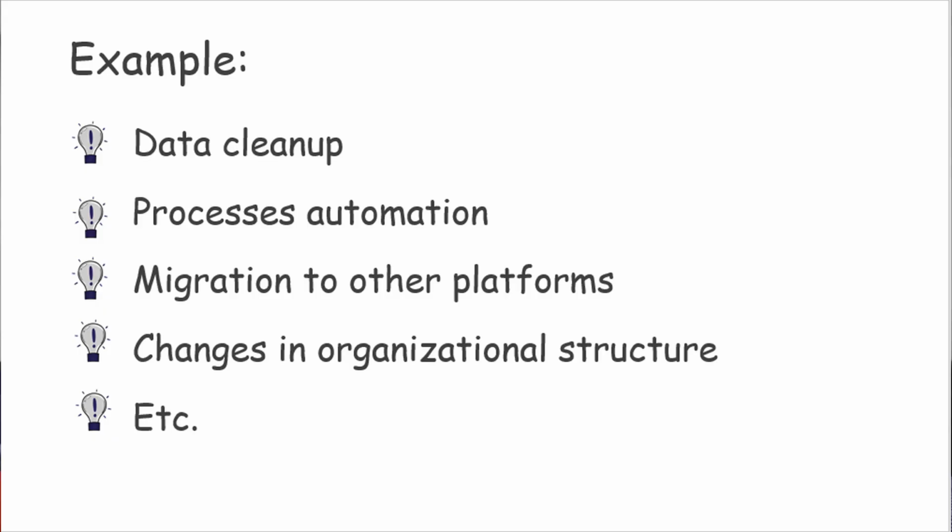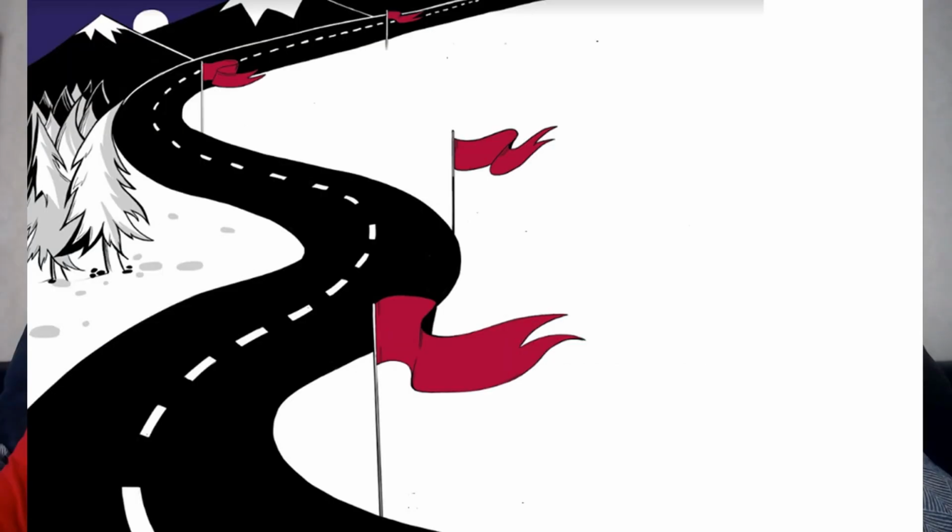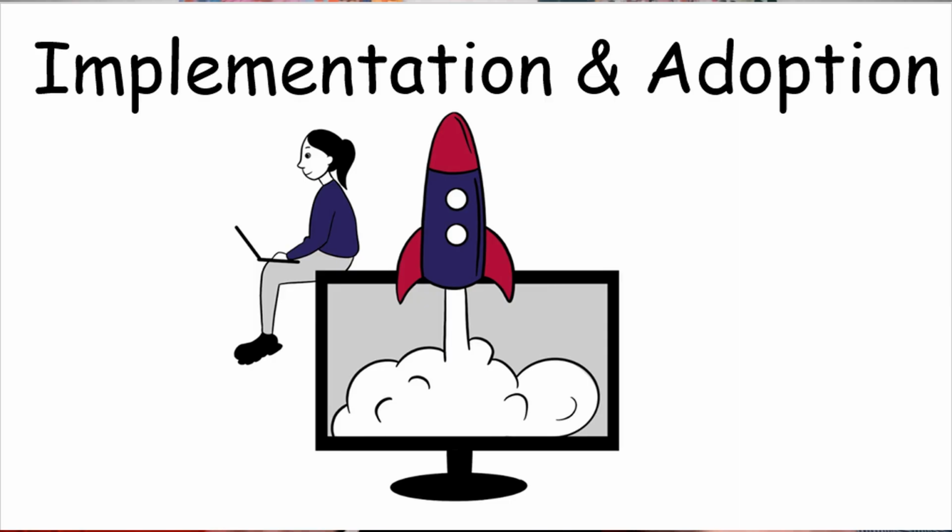In OCM, the definition of the change strategy is a more complicated process. To define the optimal change strategy, the OCM team will evaluate what it would take from the client to adopt the change and how ready the ecosystem is for the change in general. They would recommend specific steps to be taken to complete the transformation, like data cleanup, content migration, processes automation, etc. Moreover, they would create the roadmap with milestones aligning all the steps in time, taking into account the dependencies, blockers, and potential risks.